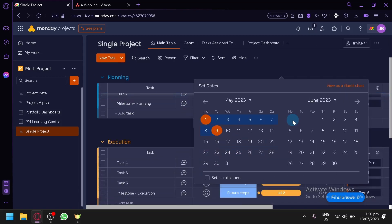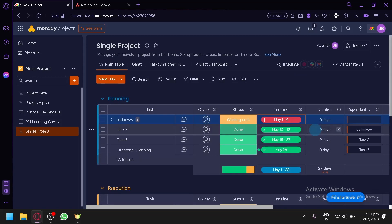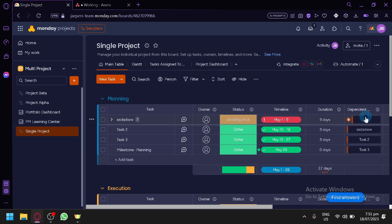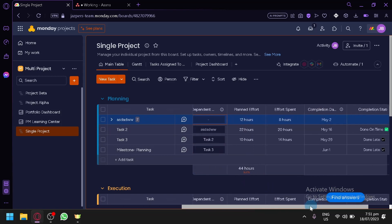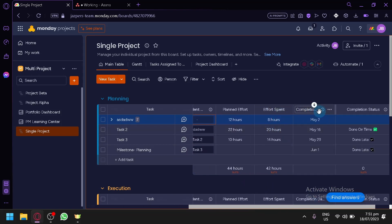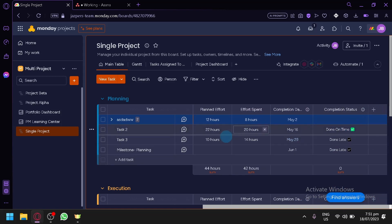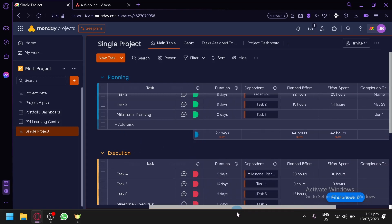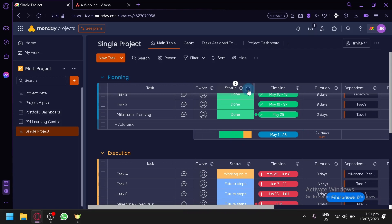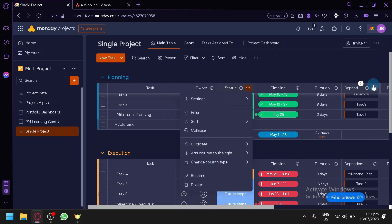You have your timeline over here. You can click this and then select the specific timeline that you would like to have as a deadline, and you can select the dates. You have your durations, you could change how long you want. You have your dependent — you can click this and add more tasks related to a specific task. Scrolling down, you have plan effort, effort spent, completion date, and completion status. You could add a lot more things to your specific task by clicking on add column and selecting from all of these options.